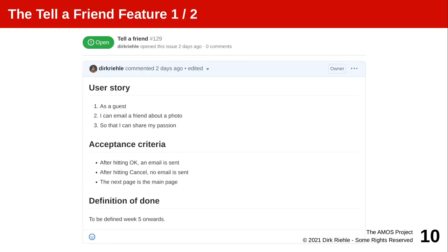Here's an example — the tell a friend feature request. The user story: as a user I can email a friend about a photo so that I can share my passion. Acceptance criteria: after hitting OK my email is sent; after hitting cancel no email is sent; and then the next page is the main page. The definition of done has not been defined here yet. As you can see, a user story and its acceptance criteria is rather short and sweet — it is obviously not a full specification, hence you will need to talk about it. Scrum is based on the idea that the knowledge of the system is in the heads of the people and not in documentation.